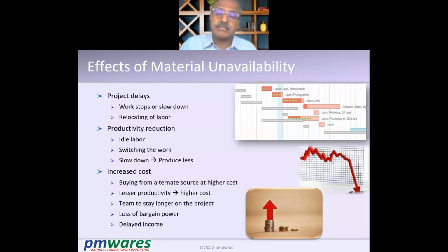Because labor gets relocated, if your material comes now, it will take time to disengage the labor from the alternative work and bring it back to the original work. So that time you will lose. For the time the labor was not working and not relocated, they were sitting idle. Switching the work also has its own toll on the effort, and therefore you lose further.